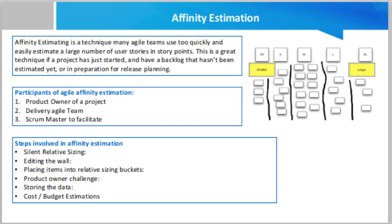In the product owner challenge step, the product owner may discuss the sizes with the team. If the team decides to change the size of a story, they remove it from the wall and place it according to the revised size based on discussion. After the entire team finalizes the estimates, the data is stored and the affinity estimation is documented, completing the process.